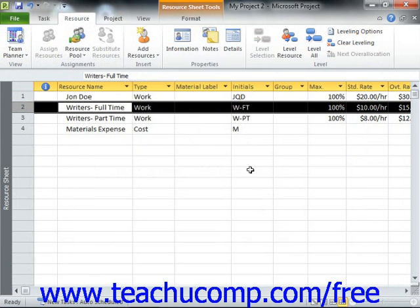In this lesson, we will examine applying various cost rates to work resources when they are assigned to a task by using the various Cost Tables. This can be useful when dealing with a single resource that may earn two entirely different pay rates based upon the type of work that they perform within the project.